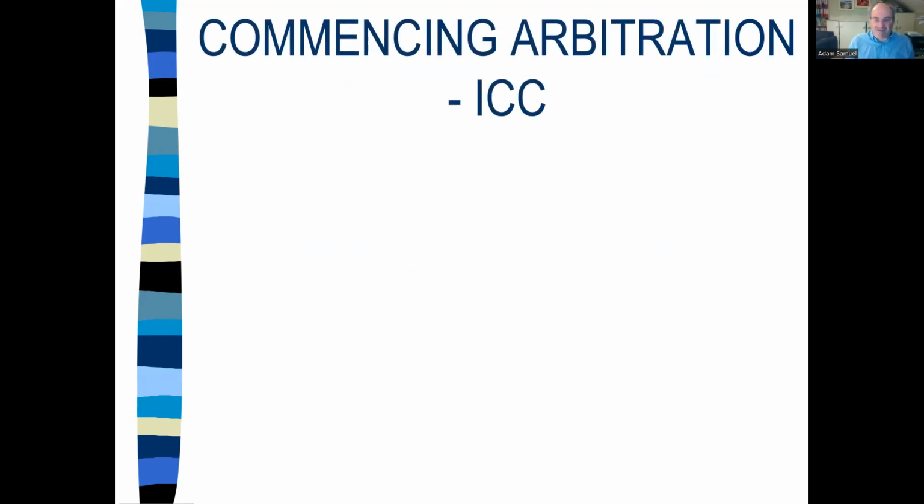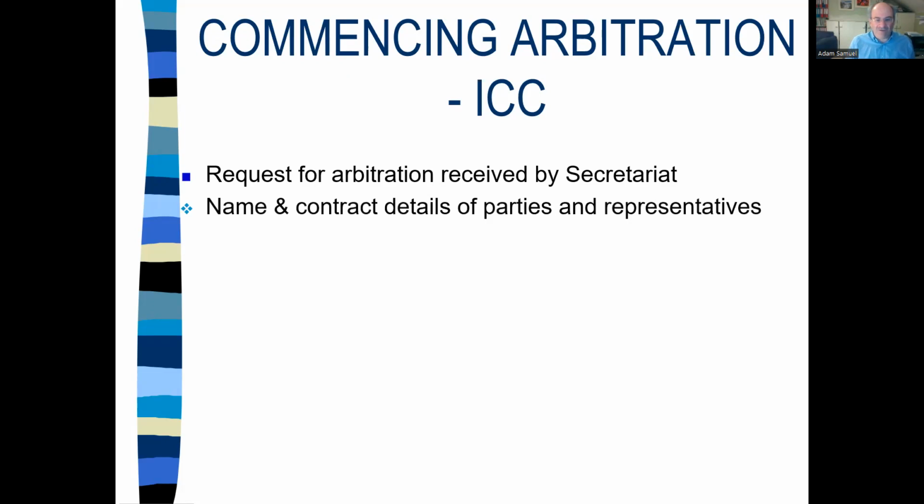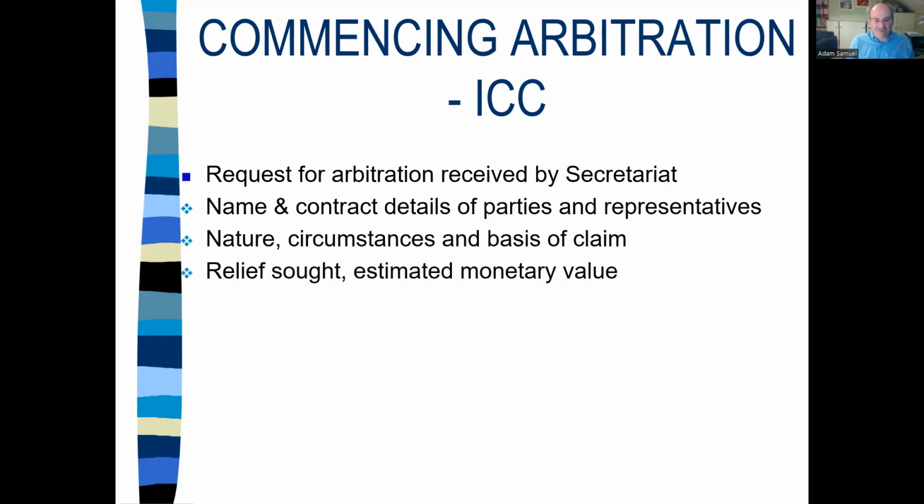In ICC cases, in common with a number of other institutions, you do this by sending a request for arbitration to the Secretariat. Its receipt commences the case, and your request has to contain certain information. Much of it's pretty obvious. It's important to get the estimated monetary value right because it affects the size of the deposit that the ICC will insist on.